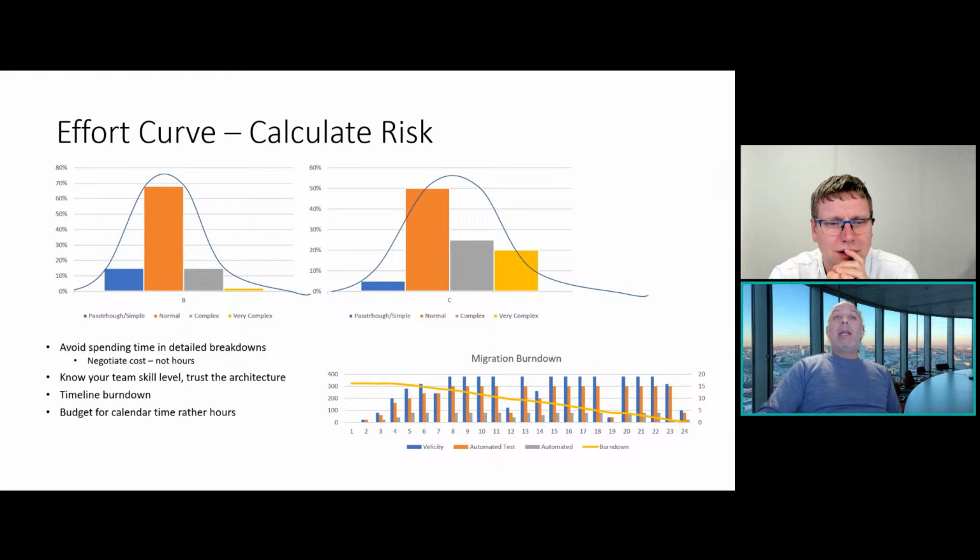And in my breakdown, I try to find the calendar time on how long it can take. Then I start looking into my resources that I will need for this. I consider things like working days and vacation and illness, things that I know statistically how much delivery I can put. And then I know exactly that, or maybe not exactly, but to a very good stomach feeling that it will take me 18 months to migrate this, right? And then I can estimate and give a cost profile out of the 18 months of work, right?